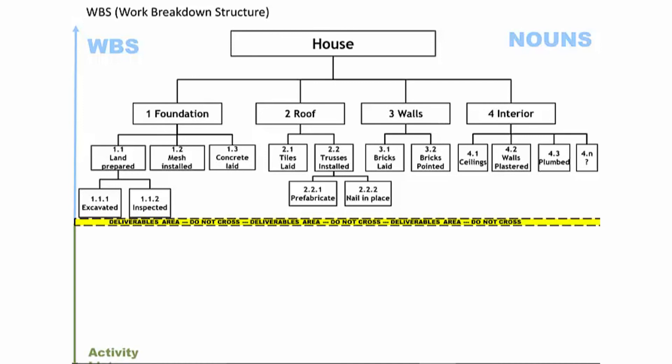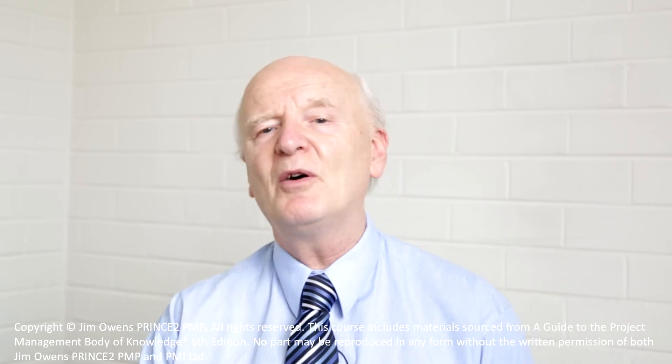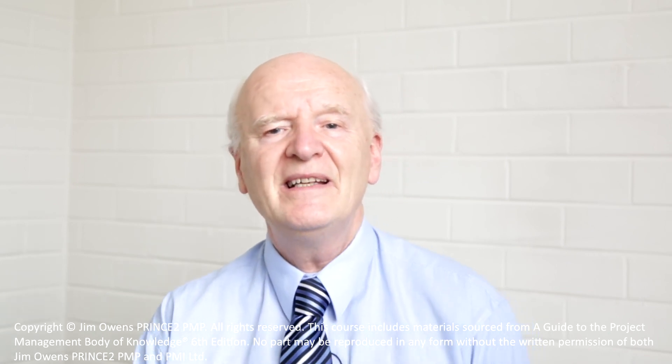For every work package in the Work Breakdown Structure, you decompose it into the activities required to produce it. You can only decompose work packages — not planning packages or control accounts. The activity list must contain only activities, never deliverables. In contrast to the WBS, which contains only nouns, the activity list contains only verbs. That covers about two-thirds of the Work Breakdown Structure topic — I hope you found something of value in this lesson.